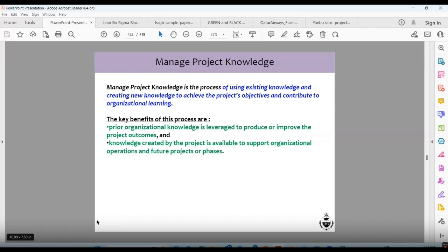Because it's a coastal area, it's very acidic, very salty. So this 125 is for any outdoor, but not if something is near the sea. That is something we learned after we had done this particular project. Now we can't do anything, but we just managed to get it painted again. So it at least managed a bit, but not so much.